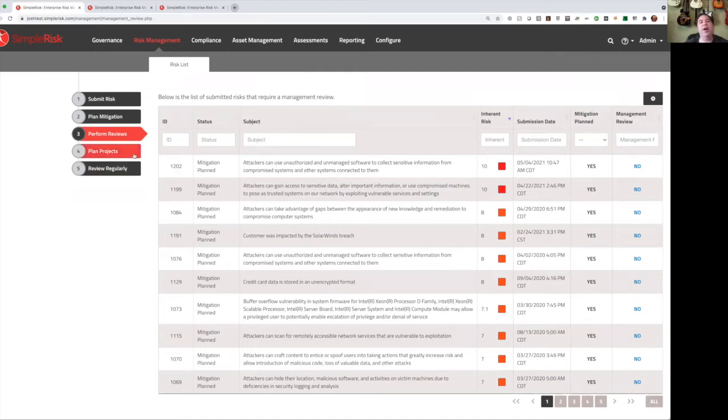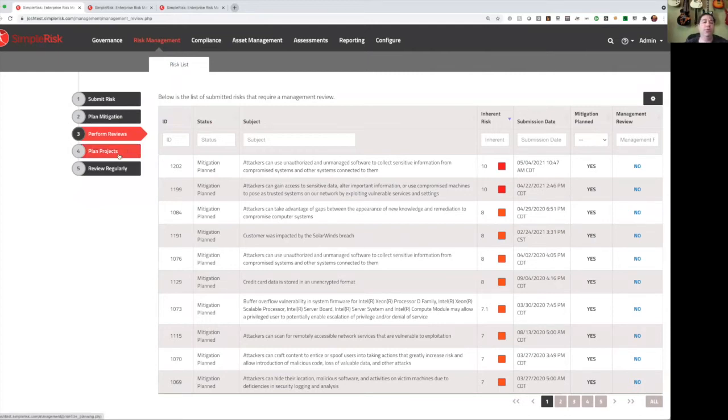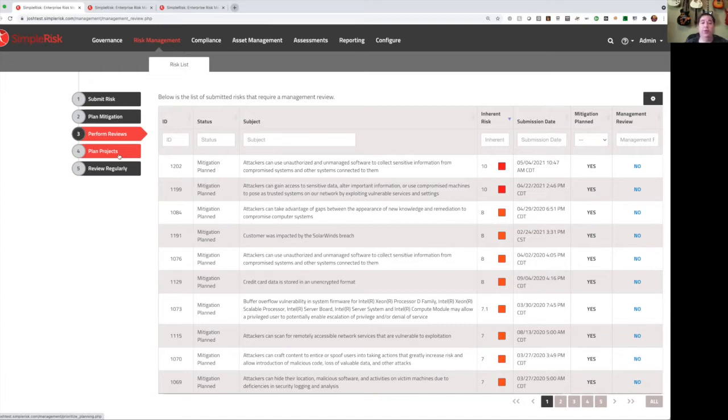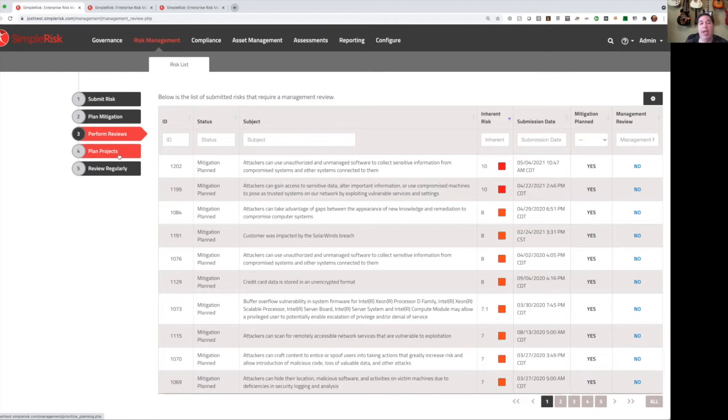For the sake of time, I'm going to skip over plan projects. But just understand that this gives you the ability to lump multiple risks into a project, which gives you two additional capabilities. One is reporting. You can report on all the risks that are associated with a given project. Number two is some batch management. You can basically take a project, drag it into a completed bucket, and that will mark every risk that's associated with that project as closed.